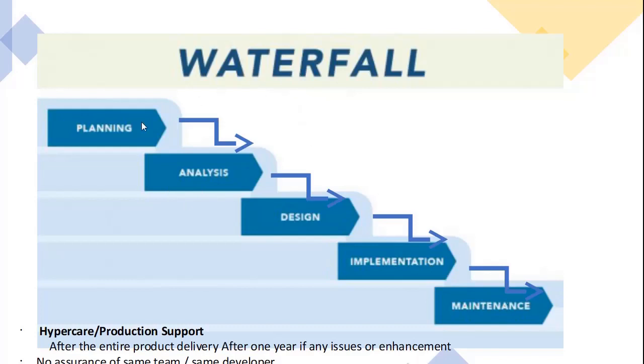That too, after one phase, you need to start the next phase. You cannot start design first. You cannot start implementation first. All the stages are dependent one on another. Nowadays also, this is a traditional model, the waterfall model of the software development life cycle. It is okay if we have only a limited number of clients or users, or it's a very small project. If it is a big project, like a two or three year project, this model will not fit that requirement.